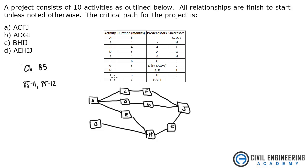Okay, now we can just write in the durations. So this was six, B is four, C is four, D is five, E is four, F is six, G is five, but it also says that it's got a free flow lag of eight when you come from D. So really, this five is, I'm going to put slash eight. Really, when we add this up, we want to use this eight. That's part of the tricky part of this. H is going to be four, I is three, and J is three.